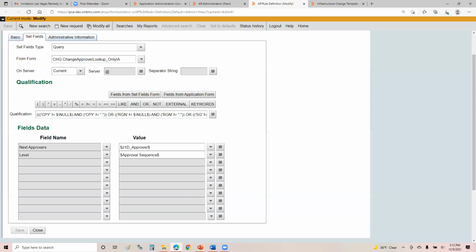Right. And they don't care about any upcoming changes unless they want to. If you have any upcoming changes, you could pull up the calendar if you wanted to and show them what changes are scheduled. People want to see the expedited and whatever other changes, even if they don't need to approve them. So you could say these are the changes that are scheduled to take place in a report as well, which is helpful because they're not going to meet again until the next week. Then they can be aware of what's coming. The CAB shouldn't take more than an hour, which is what you want to try to get it down to. And that's why I do the approval notifications, so they're aware of it.